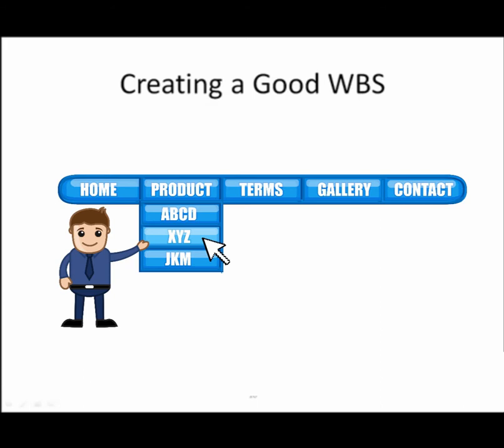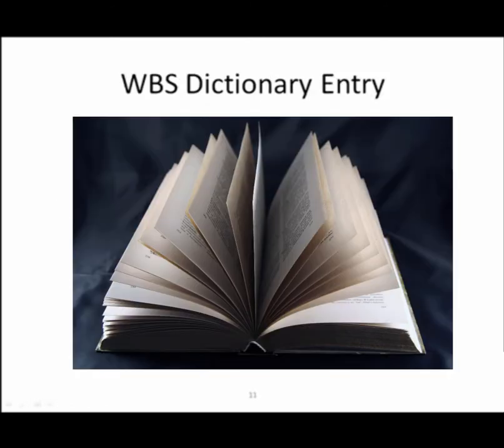Sometimes people confuse tasks on a work breakdown structure with specifications, or think it must reflect a sequential list of steps. That's not it at all. You're actually defining areas of work in a hierarchical tree. If you wanted to get the very specifics of each one of the tasks, you would use what's called a work breakdown structure dictionary with different entries. This is simply a document that describes each work breakdown structure task in detail. It describes what is in each work breakdown structure element, and it may also say what is not in an element if it is unclear.